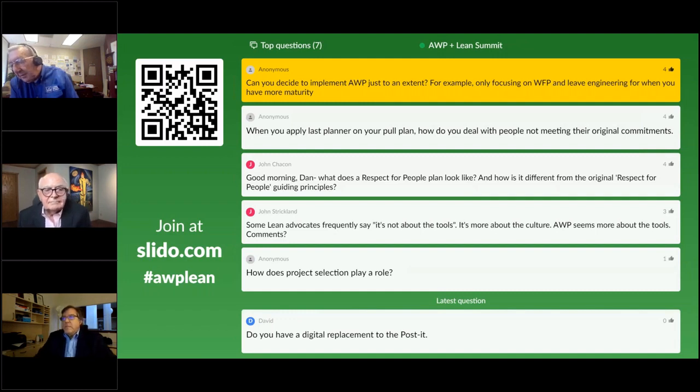So I'll jump in on that one, Lloyd. I think most of the construction guys started out doing work-based planning. In other words, you get a bunch of stuff out there in the field, you've got a planner out there, and he starts looking at what can I do and putting together packages. So yes, you can do that, but it's not AWP. You're just doing work-based planning. You're doing planning at the job site based on what you have available.